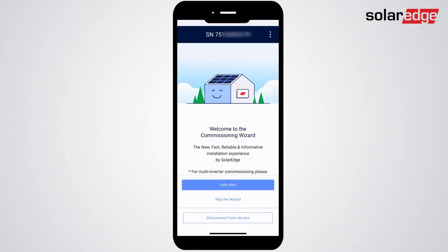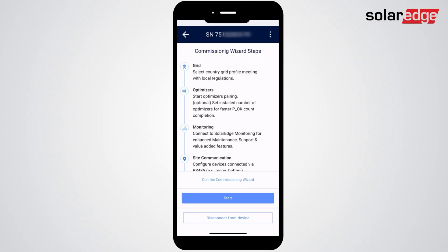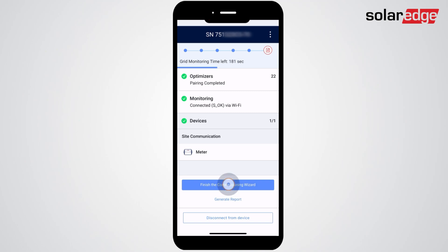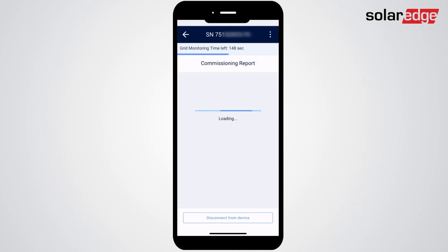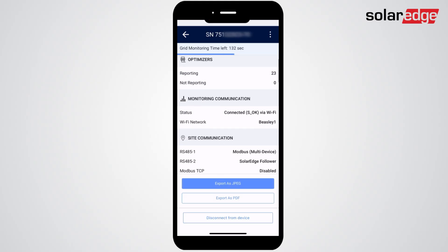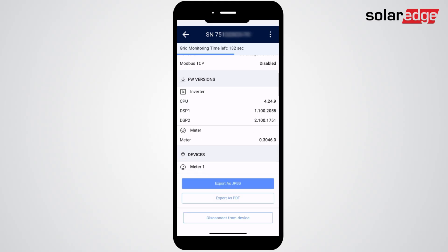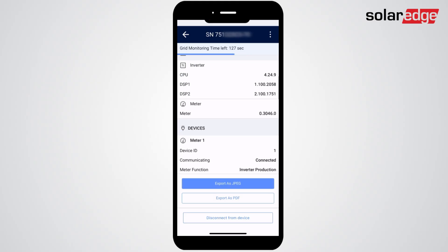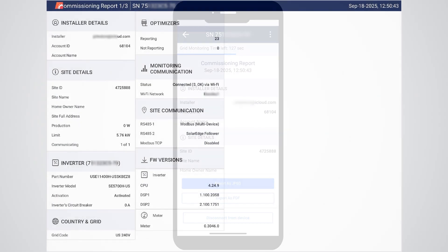Now just follow the commissioning wizard and it will walk you through the pairing and configuration of your inverter. Once done, click Finish the Commissioning Wizard to view a report detailing the inverter configuration settings. This report can be exported by clicking Generate Report to save a copy directly to your phone for documentation.